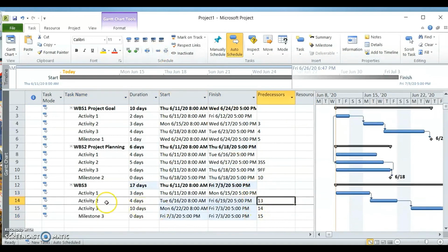That's the automatic way. Imagine if you have your normal projects, they will have a lot of activities. Your Gantt chart has thousands of lines. So by just clicking everything together, linking it up automatically, because most activities are finish to start, you can just do that. Okay, I want to show you one more thing here.